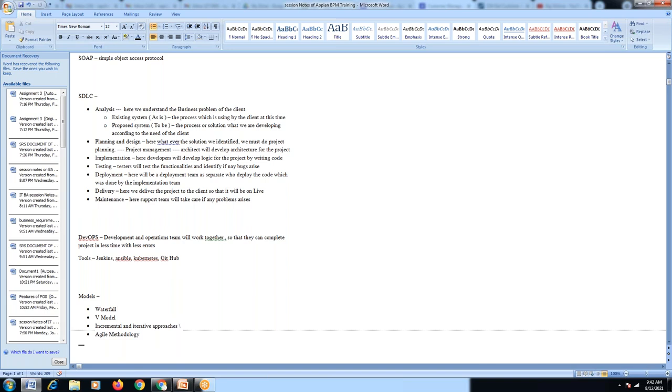But in the waterfall model, the traditional model, you don't see that. In agile, the advantage is that you can develop the project at any point of stage, and the delivery of the work you have completed so far will be converted into weeks. You don't take months in agile, remember. Almost all sprints you develop in an agile environment will be 2, 3 or 4 weeks. It's not months. Within 2-3 weeks you have to complete the task.